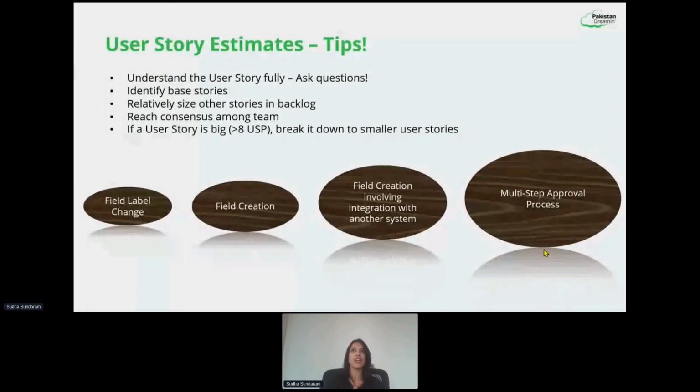So always think when you're writing your user stories, when you're creating it, while you're grooming it, can this be broken down into smaller stories? Am I fitting too many objectives in one? And you may really want to take that decision and keep it as small as possible, so we are able to realize business value sooner and faster.